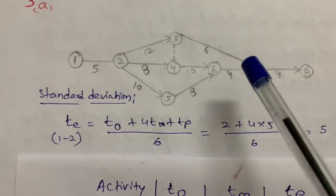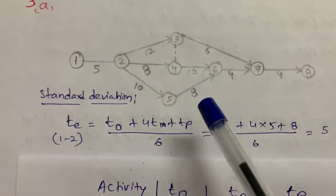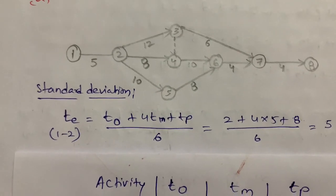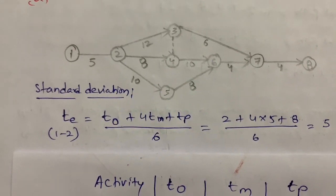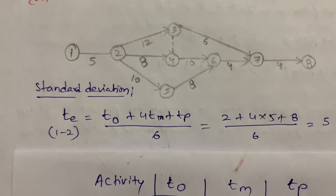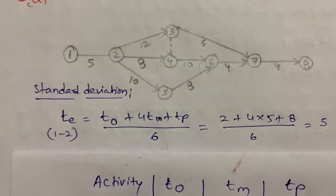After adding all these three paths, we will get the maximum value. That is the maximum duration of completion of the project. Like that, we will plot the critical path. I hope you understood this. Thank you so much. Thanks for watching.